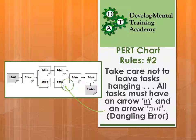The second rule is to take care not to leave tasks hanging. All tasks must have an arrow in or an arrow out. As indicated here, this task in the middle has no arrow leading on, so effectively you get to this point and have to stop — there's nothing further you can do because it leads to nothing. Ideally you'd have an arrow leading on to the next idea. The only tasks that don't have an arrow in or out are the start and finish tasks. The start will have an arrow out but not in; the finish will have an arrow in but not out.